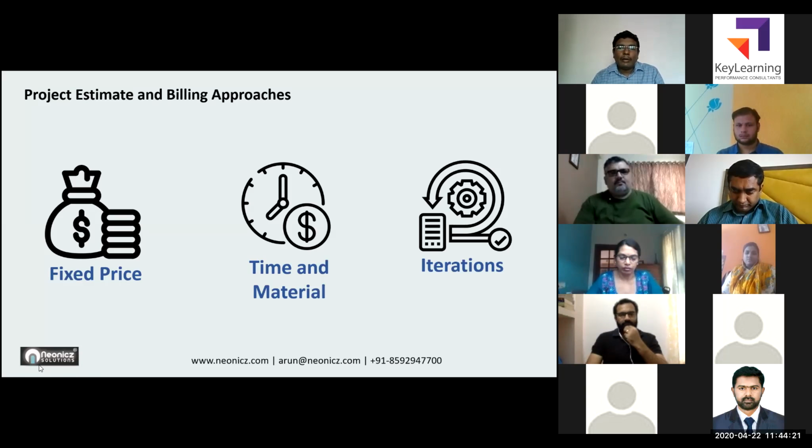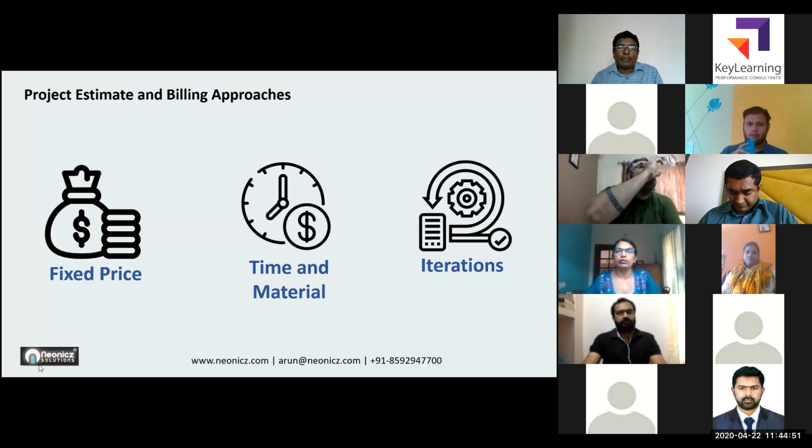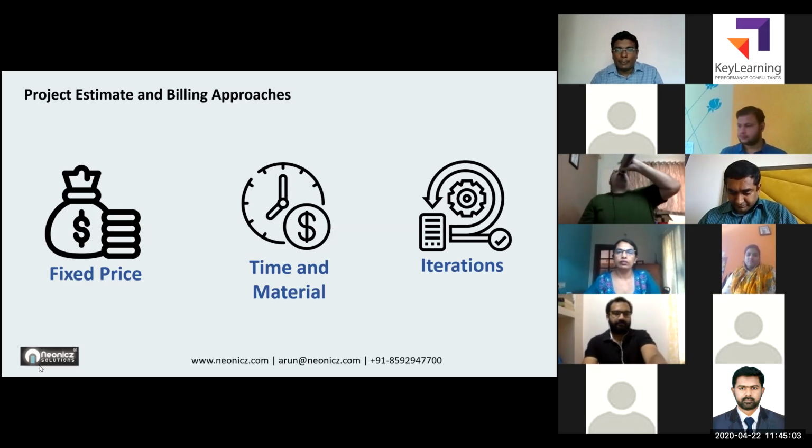So that is how you can reduce your cost when, for example, you don't have much budget, so you want to hold on with the current product. Still you will definitely have a product which is actually useful in your hand. So in 3 months you made the product reach a certain level which is actually useful to the users. Even if new features didn't come in after the 3 months because you don't have a budget to implement them, still the people can use the product. So that is the advantage of having an iterative or incremental approach.